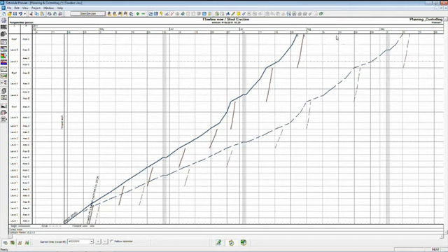And we're not talking about a 3-day delay now. We're talking about a month-and-a-half delay. And so this is when we might want to go back into the system, look at that. We're assigning 9 men to this task.